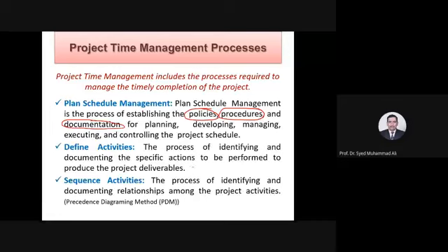For example, if you have foundation excavation starting on 1st of May, ending on 10th of May, then after this lean will start. Concrete lean has to be done. Now let's say it starts on 11 and it ends on 15th of May.